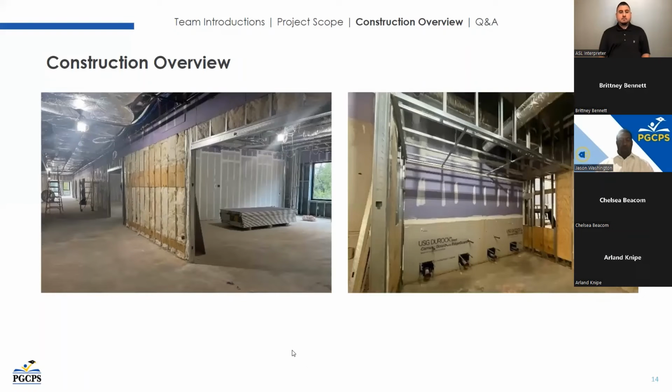So this is from our A tower. Again, we've got the one siding going on, our insulation, in-wall blocking, all of our electrical and in-wall mechanical inspections are ongoing. We've got about 75% of our in-wall close-ins signed off. We just have the 4th floor for our electrical inspections, which will probably happen in the next 2 to 3 weeks.